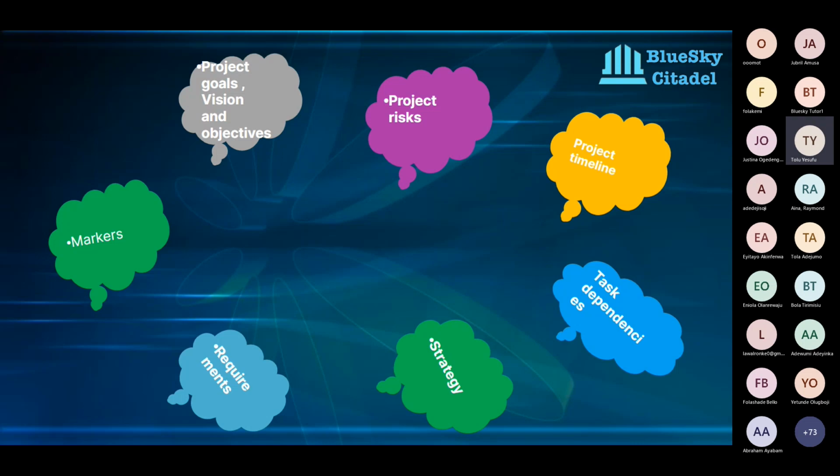It's just like setting your different milestones on your different roadmaps, on your different timelines. When things change, things move around. But showing on your roadmaps where these markers are set would enable the stakeholders and the team to check on the timelines when they need to, and see what has changed. You know, we had something planned for the second week in January. It's been moved to the end of January. What has changed? So we want to have those different markers. So these are some of the things that should be included in your roadmap.